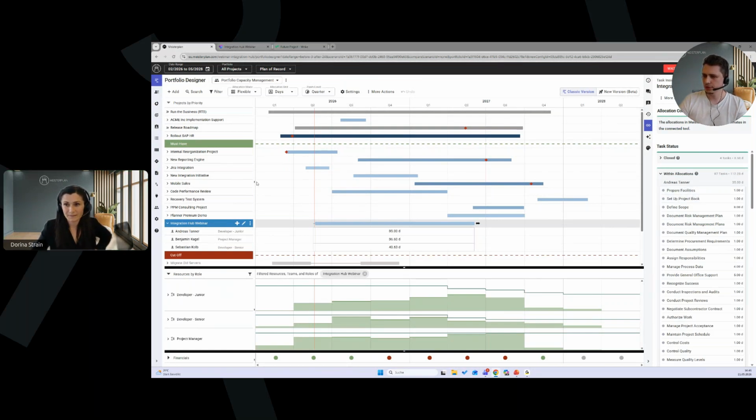And Benjamin, yes, there's a question. Sure. Where does the start and end date for the project come from at this point? Yeah. So this depends on a tool. There are task tools where the project itself does have a start and an end date. If so, we use that information. There are tools where the project itself does not have a start and finish date. There we use a default range.